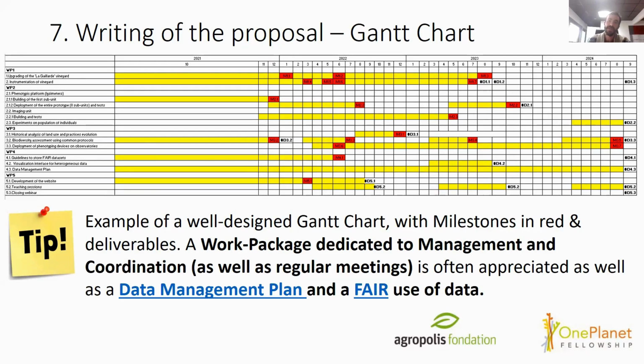And as well on the data side, now the management of data has become more and more important. So it's quite good to have a data management plan. I don't know if you're familiar with it, but basically it's a tool that will allow you to explain how the data generated by your project are going to be stored, who will be able to access it, all of that. So I won't go too much into detail, but if you click on the data management plan here, when you receive the presentation, it will bring you to a website where you have lots of information.